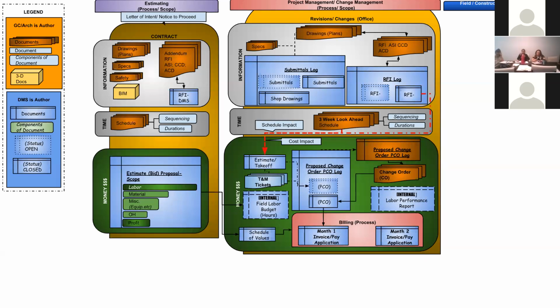So if we're on a project that's only going to take 2 months to build, we only really got 2 shots to collect that money before we build. If it's after we've built, what we refer to as you've lost leverage, and you're like, wait, we're trying to collect money. Remember, this whole estimate was for us to collect money before we did the work, and now we're trying to collect money after we did the work.